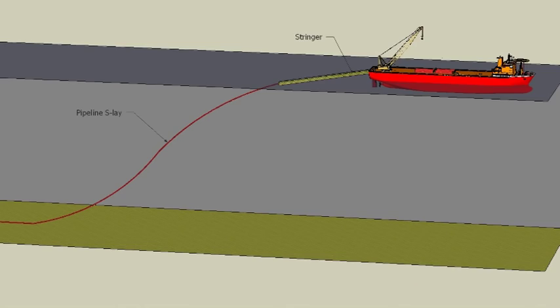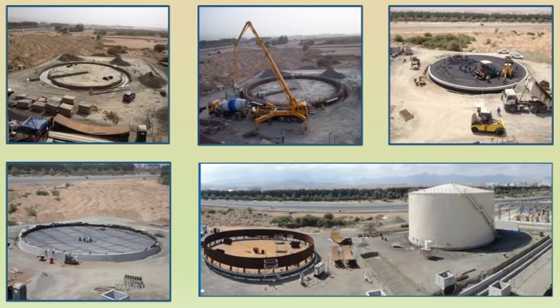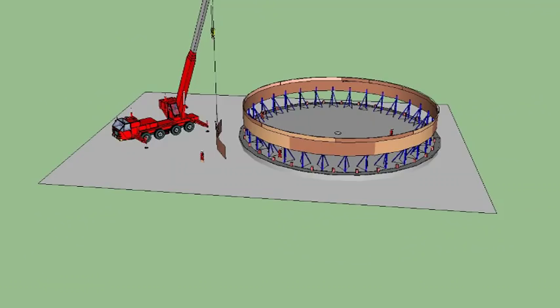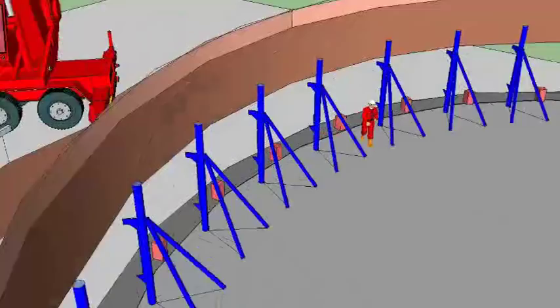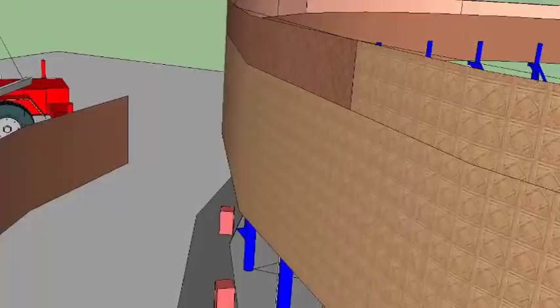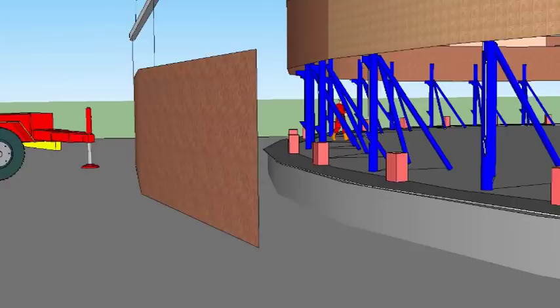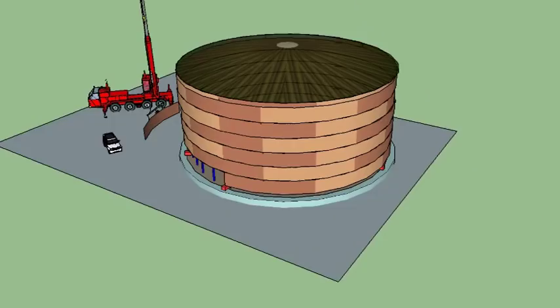Steel Circular Tanks. The tanks are constructed using the jack-up method. Curved steel plates form the wall rings. The tanks are used mainly to store fuel.